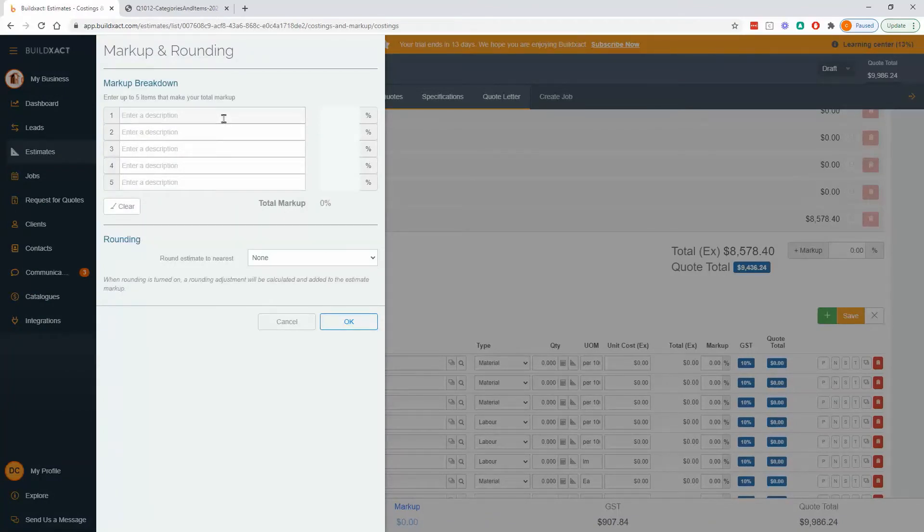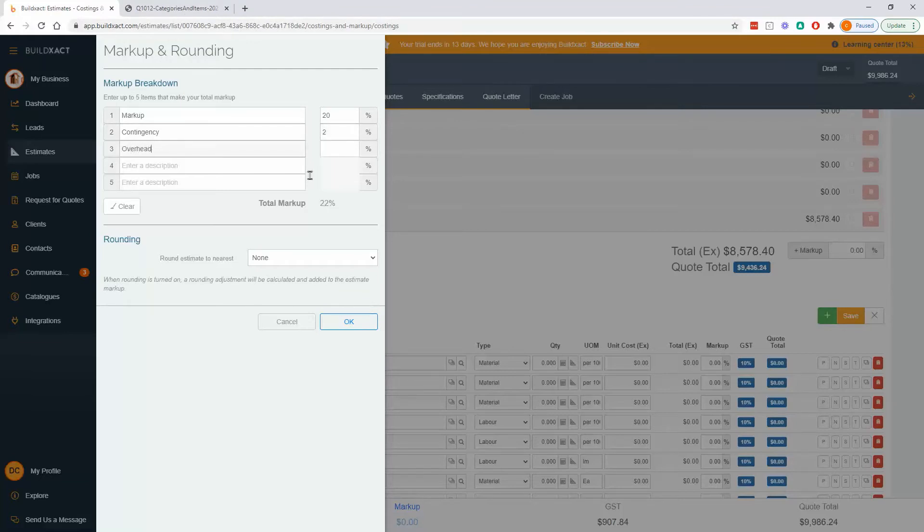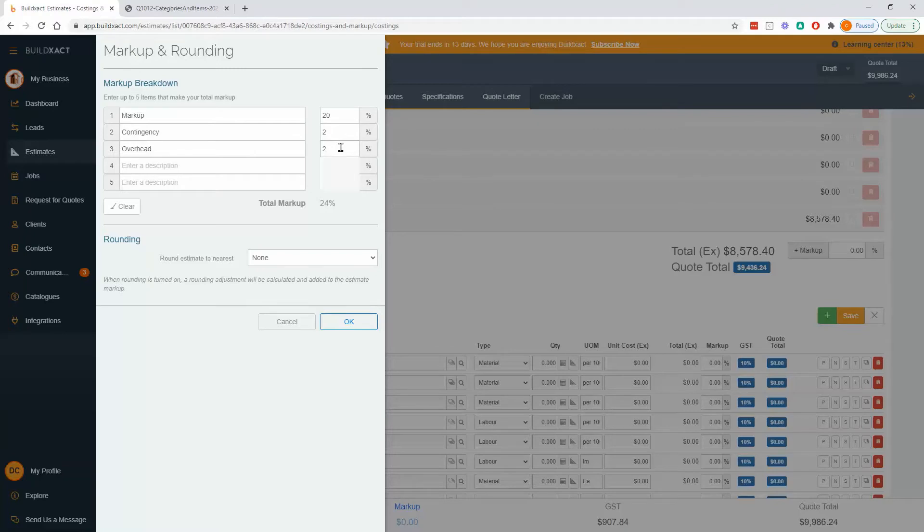And you can break this down as many ways as you want. So for example, we get people who go markup 20%, maybe contingency 2%, overhead if they like, whatever you like. And the benefit of having this broken down, if you want to do it, is really just that you know what portions are what. So if you need to get a bit of wiggle room on the quote price, you can touch the markup. But generally speaking, contingency and overhead probably should be left as is.